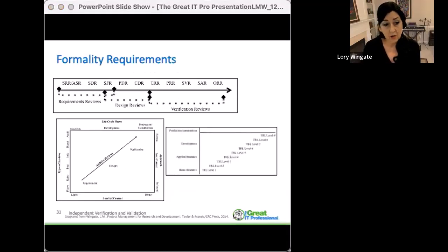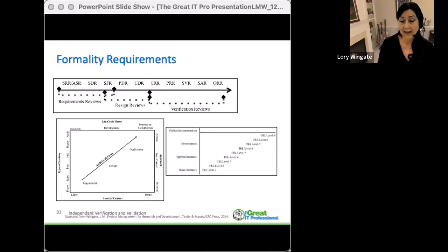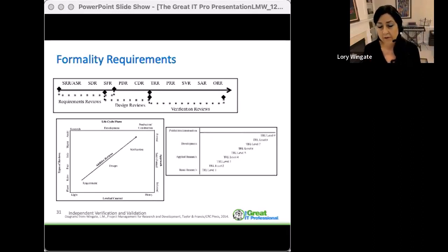So, depending also on the life cycle phase of the project, quality can be built in through the strategic application of reviews. Throughout the system lifecycle, quality is controlled across all process areas in many ways. The two methods that are identified as essential are the use of audits and gate reviews because they have been shown to be highly effective in assuring quality. And formality requirements from the customer, from other key stakeholders, and from the organization will drive your tailoring options. And I have another presentation, another webinar on tailoring. If you'd like to look that up, I would love to have you review that as well.